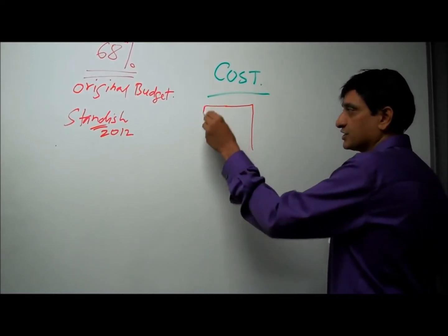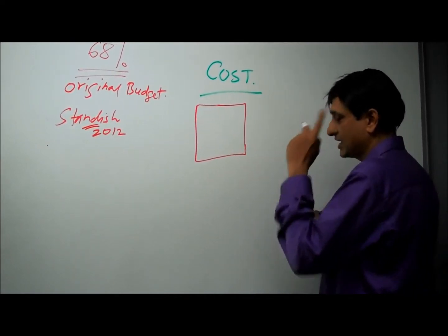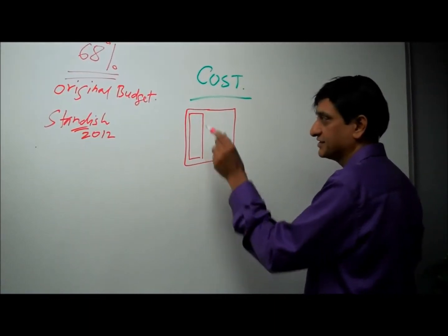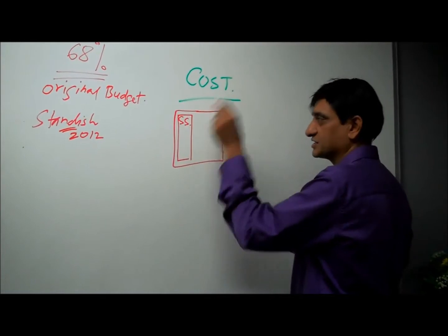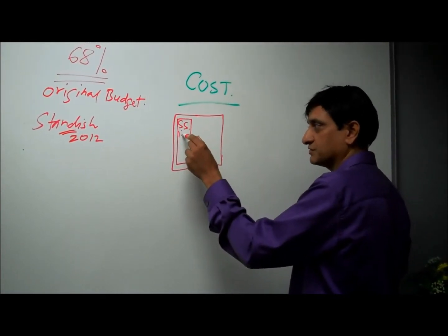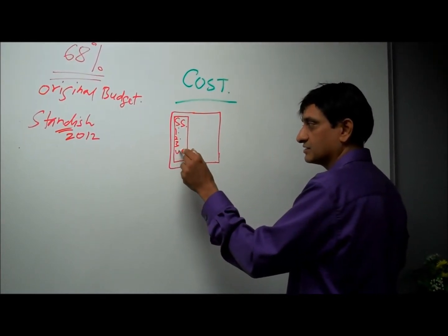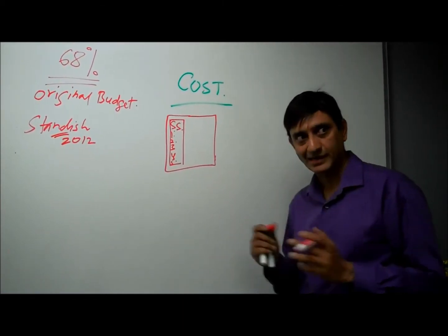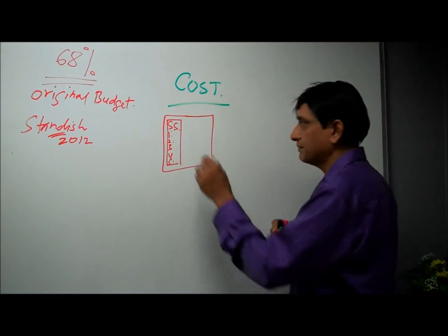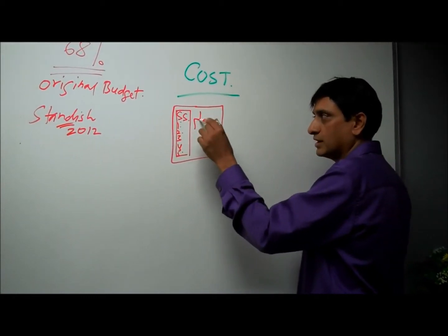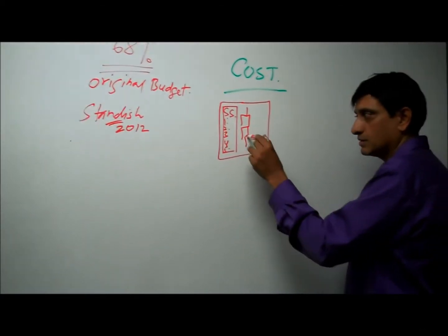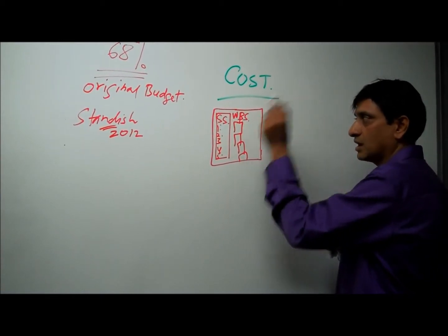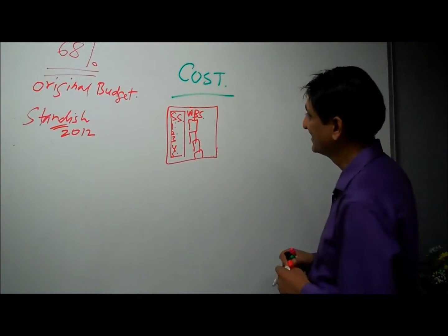Initially in the project, we have a scope statement which tells us what we are going to achieve. A very well-defined scope statement lists the inclusion and exclusion criteria. Once we have that, based on the scope statement, we create a breakdown of the work from top to bottom, and we call that a work breakdown structure, right?